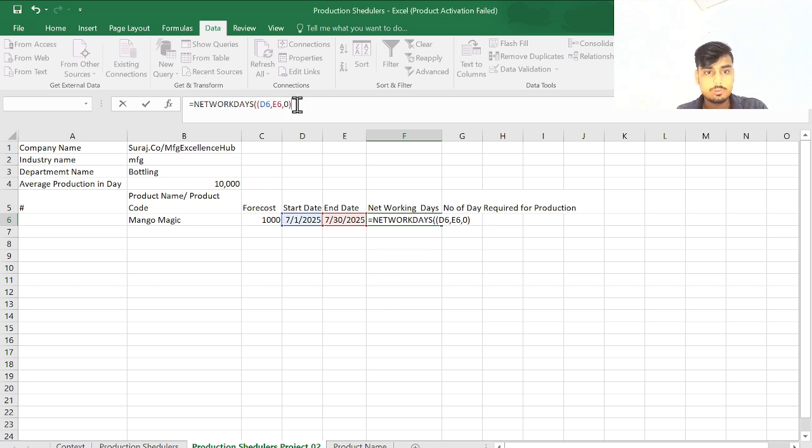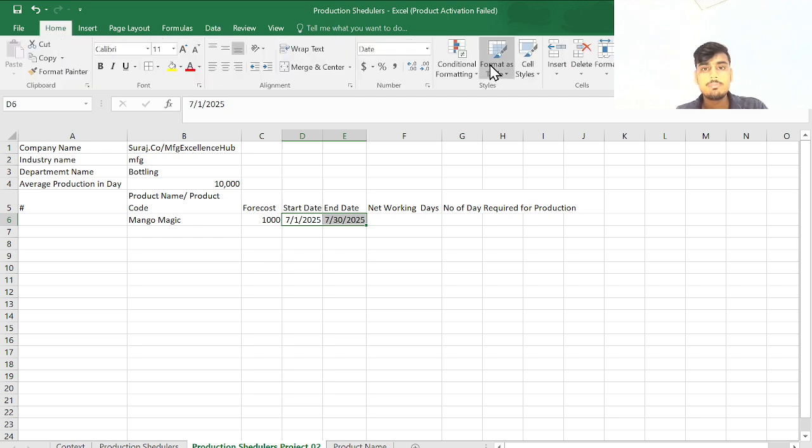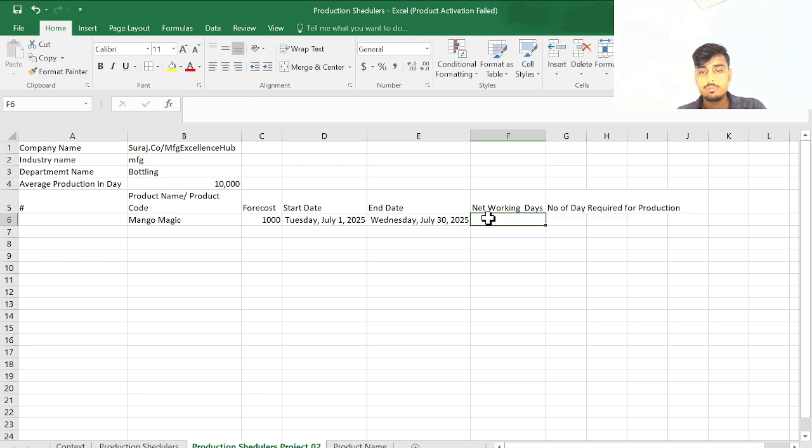What is going on? Wait. I will put a long date. Okay, it's good. NETWORKDAYS formula we will use here: start date, end date, and for holidays I will put 0. Just enter. Here we get the networking days.